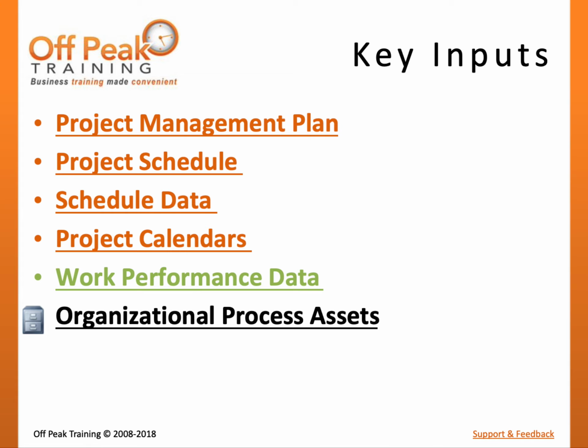Since most monitoring and controlling processes focus on comparing project execution with approved plans, we can expect to find both planning and executing components as inputs. The project management plan includes the schedule management plan, which describes how this process should be performed. It also includes the schedule baseline, which is the reference point for all schedule performance measurement.